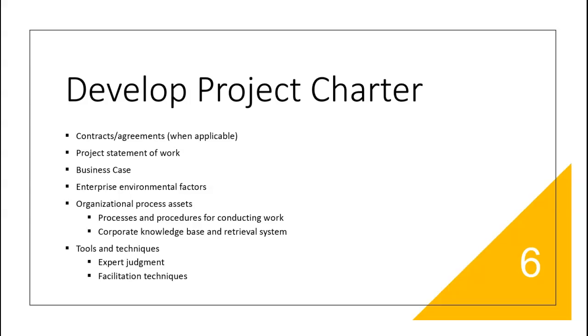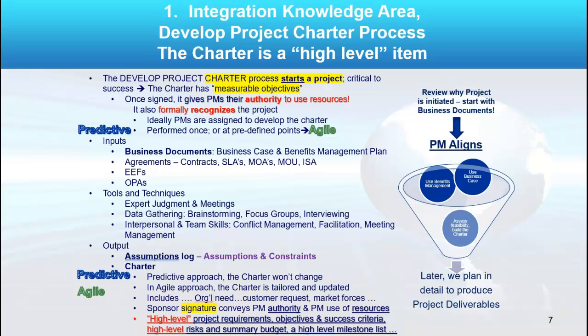You might also look at OPAs, or organizational process assets. These are processes, policies, and procedures. They're templates, standardized guides, communication requirements, financial controls that the company's already set up that you have to use, and change controls that are already established, right? They will also include historical information and lessons learned, right? What happens if you didn't create a charter? You have trouble, rocky waters ahead.